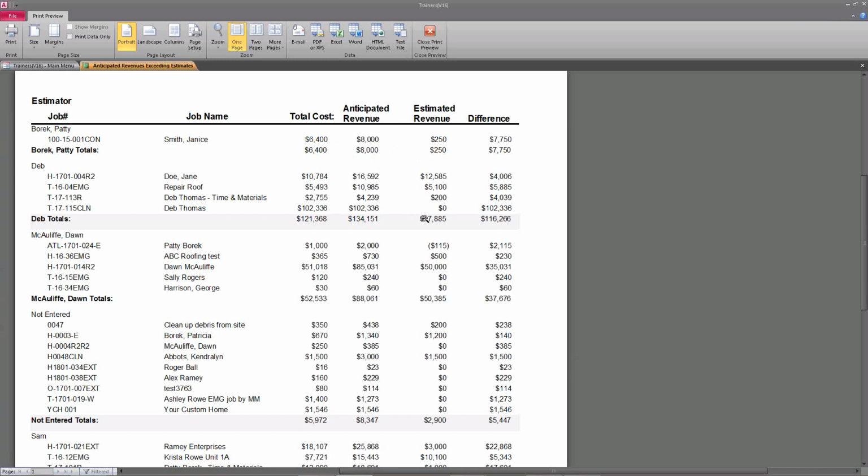Best practices is if the mail comes, everything gets posted. If there's some concern or approval necessary to pay it, you put it on hold so that the system won't let you pay it until that concern or approval was addressed. But it gets that cost in the system where it's visible, and you get valid, accurate work in process and financials out of it.